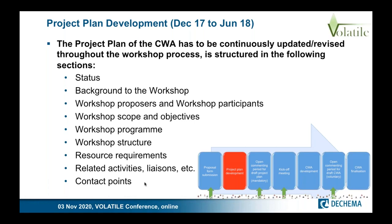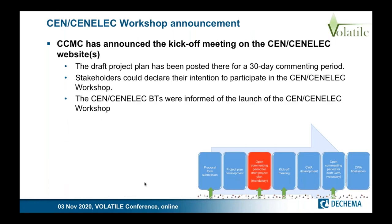With this work plan, you go through a first open commenting period for the draft project plan. This is a 30-day commenting period by stakeholders. In that time, stakeholders could also declare their intention to participate in the workshop. The technical bodies of CEN-CENELEC were informed of the launch of this CEN-CENELEC workshop.